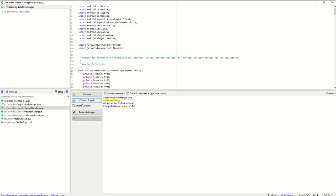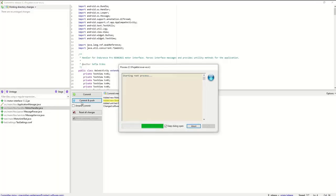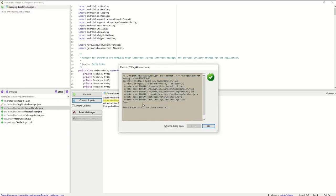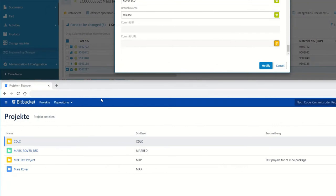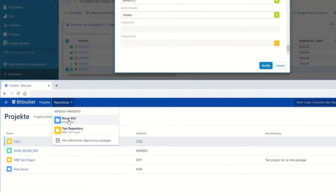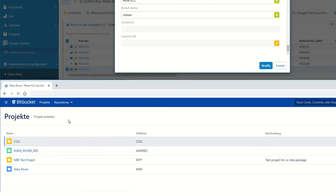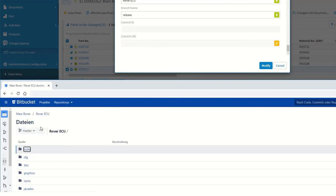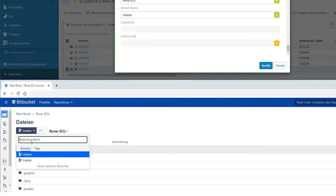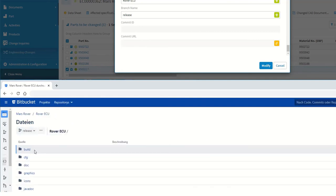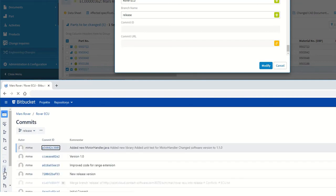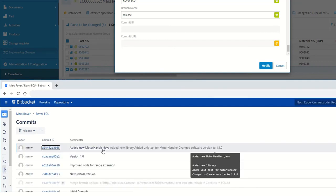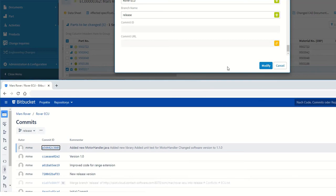The following section shows how, in the context of an engineering change order, a new software version is created in Bitbucket and made known in the EC master or PLM system. The user changes the affected source code in their IDE and releases a new software version in Bitbucket. The necessary release and build routines can be added or triggered as required.